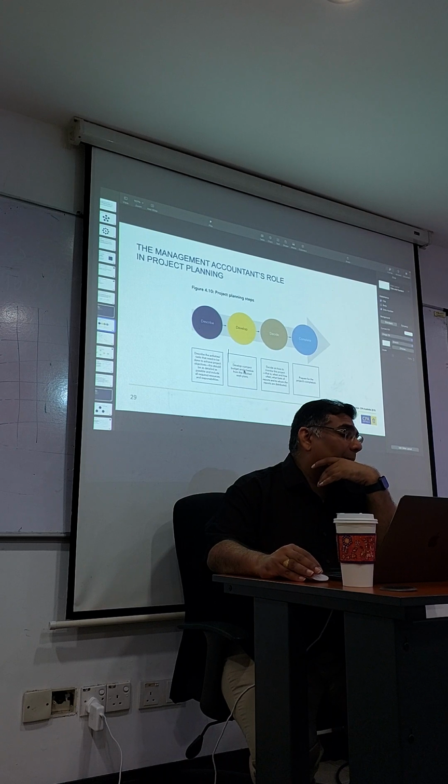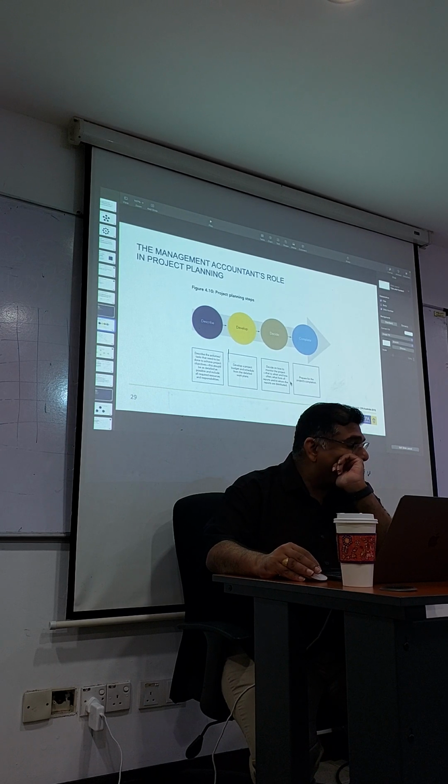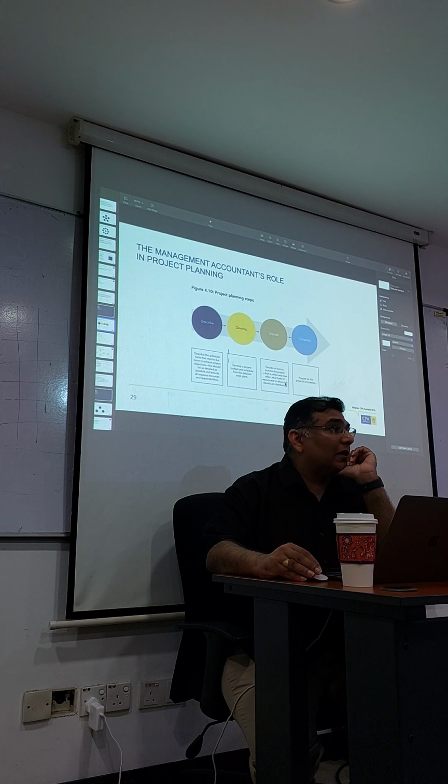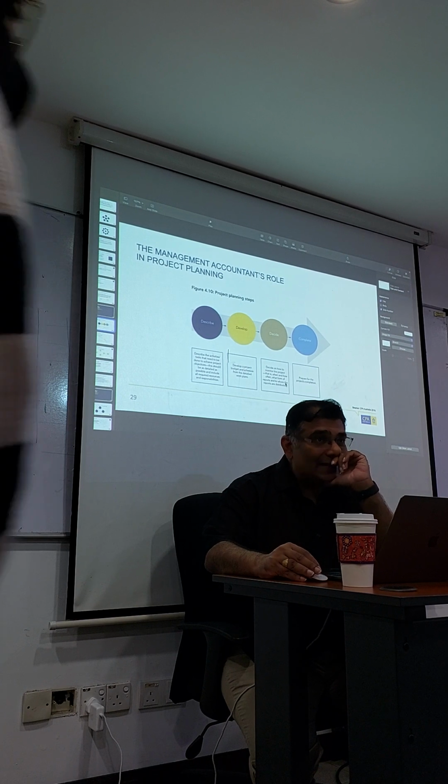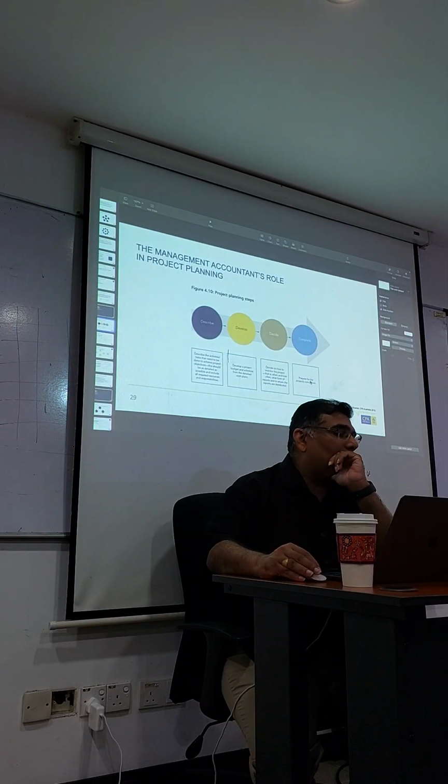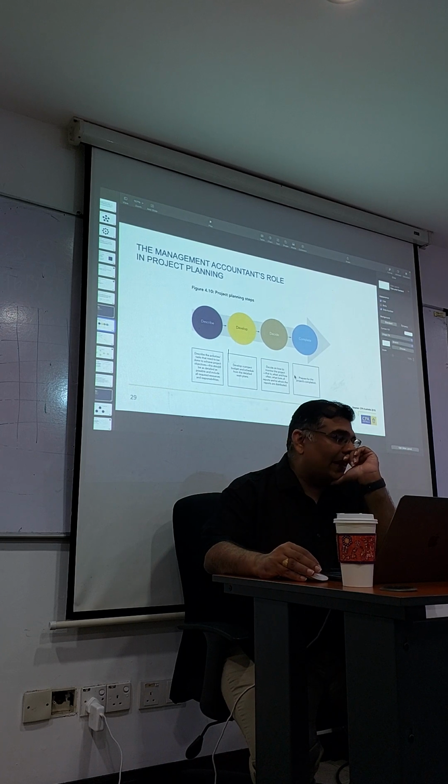After that, you develop the project budget and schedule from the detailed work plan. So for each work, what is the costing? Then, decide on how to monitor the project, that is when and how often, what form of report you need to use, and to whom the report goes out. So you have to decide the monitoring steps. Finally, prepare for project completion. When it's ended, you must close off the project.